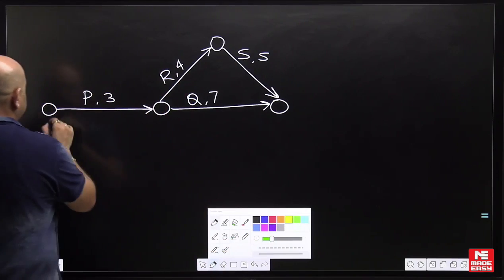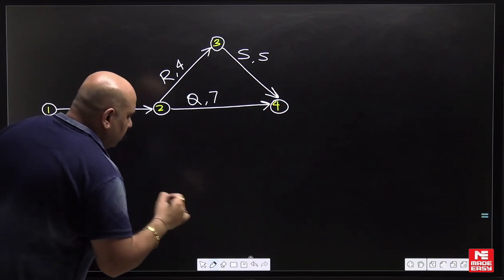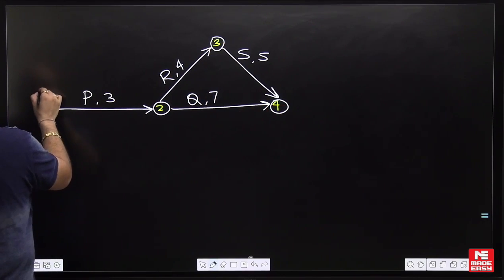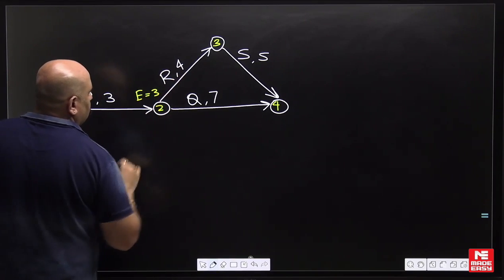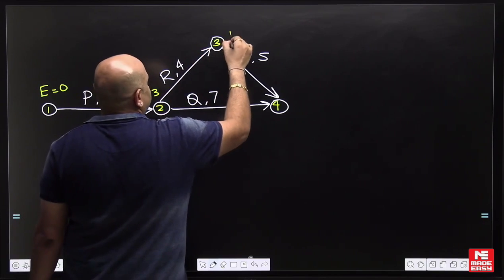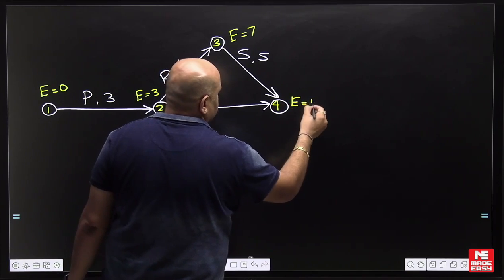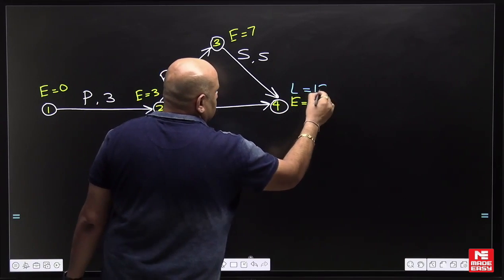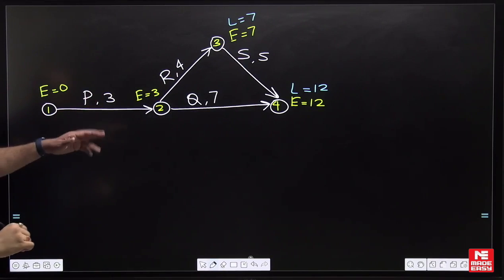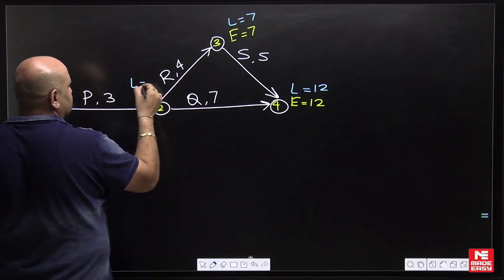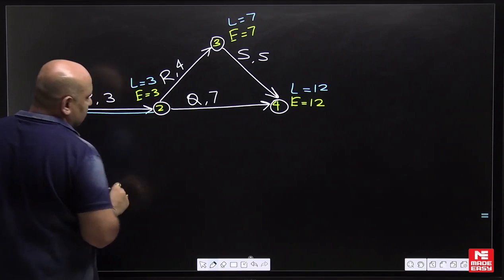Based on the data we made the network diagram, then we perform forward and backward pass. Numbering the events 1, 2, 3, and 4: earliest start time is zero; for event 2, it is 3; for event 3, it is 3 plus 4 equals 7. For event 4, there are two options — 7 plus 5 equals 12, and 3 plus 7 equals 10 — so the maximum is 12. The project duration is 12 days. Backward pass: taking L equals 12 for the last event; for event 3, 12 minus 5 equals 7; for event 2, two options — 7 minus 4 equals 3 and 12 minus 7 equals 5 — we select the minimum, which is 3; and for event 1, it is 0.